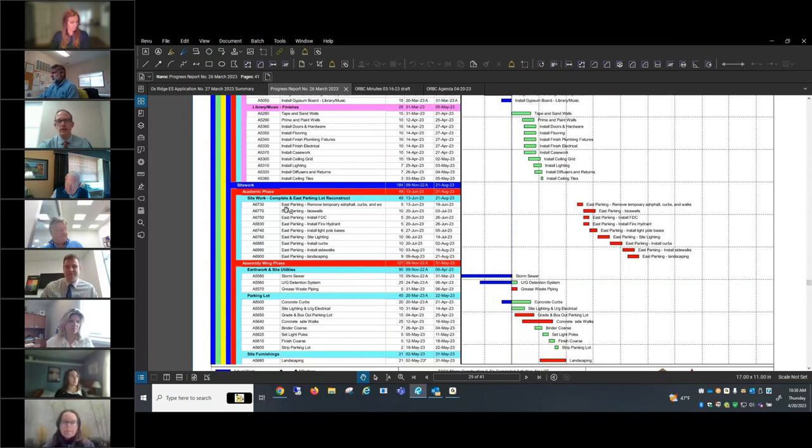Okay. And a lot of this work, the bioswales, cutting and curbs, we're not doing very large or deep excavations, so that minimizes the weather. Like today we're putting in curbs, and if you get a light rain, you might delay it, but you're not digging an 18-foot hole that might fill with water. So the impact of the weather is a little bit less than when we were doing the original lot, when we were digging those 20-foot excavations to get the sanitary sewer in.